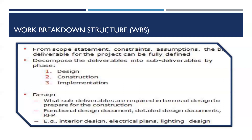When creating a WBS, decompose a deliverable into sub-deliverables by project phase. You may include all project phases or focus on certain areas depending on the scale and complexity of the project. You have to consider the approval and scope, design, construction, testing, and implementation.